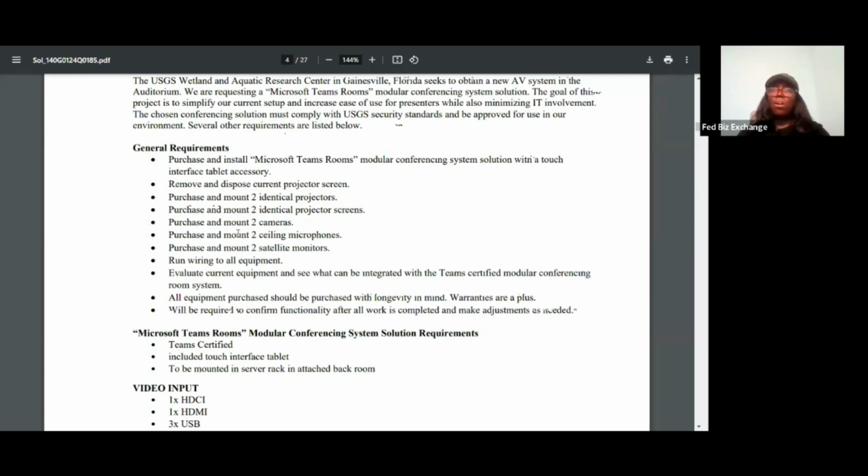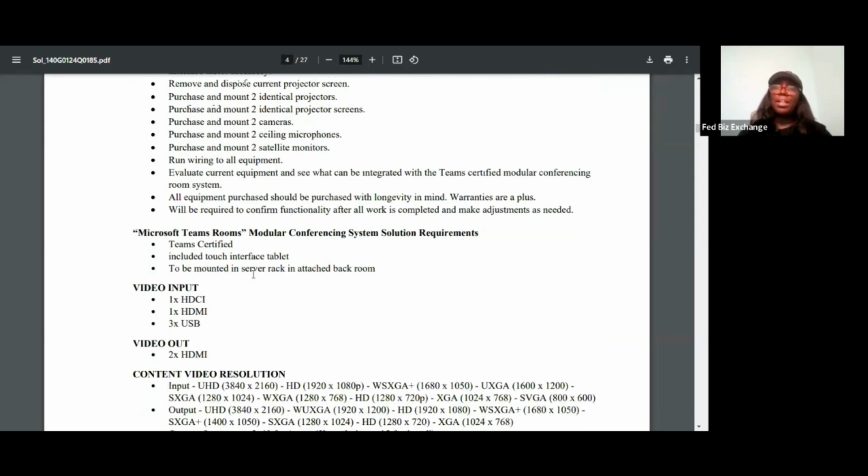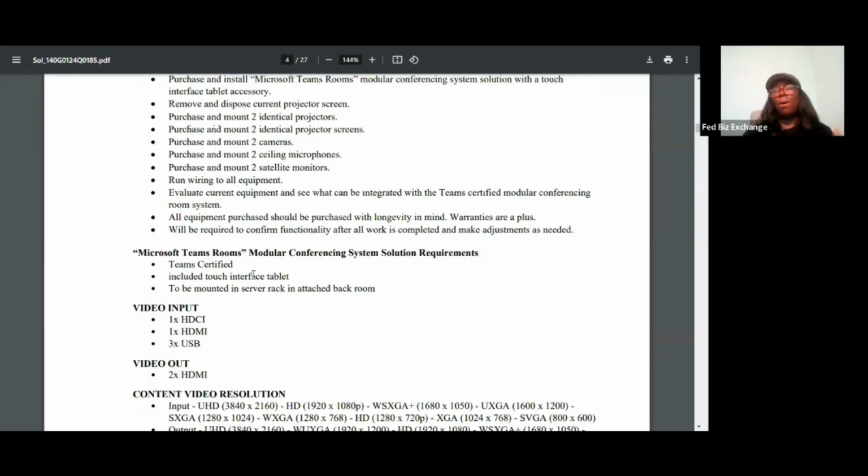Okay, so they would take all of the details for all of the equipment, and there may be even some things on here that the government, the federal buyers, contracting officers, did not put in here. Now, one of the first things I would do also is I would go and look and see if this was a contract before. Who did their first setup, to see if there's some pricing. The other thing I would do is once they got the equipment list together, you start talking with the suppliers, and then you get the pricing, and then you mark it up. And then you work with yourself or whoever to figure out what does the process look like.